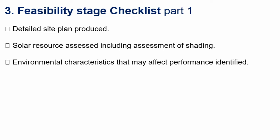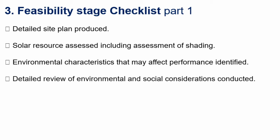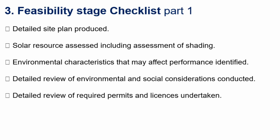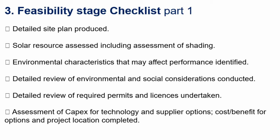There could be a lot of sand accumulating on the modules, or dust from a nearby industry, or trees that shed leaves in winter — you have to make sure the modules are cleaned. There could be other constraints too: for example, a project in Switzerland with exceptional large hail required purchasing heavy-duty modules that can withstand it. A detailed review of environmental and social considerations is conducted — usually less critical than for wind power plants. For example, if you install a solar pumping system and there's already an existing pumping operator who loses work, they may oppose your project. Assessment of CAPEX for technologies and supplier options — cost-benefit for options and project locations is completed.